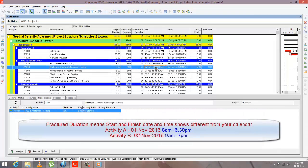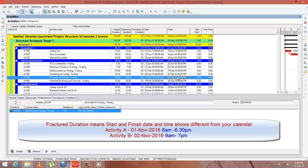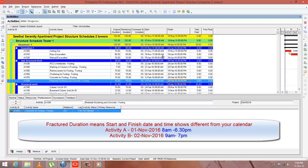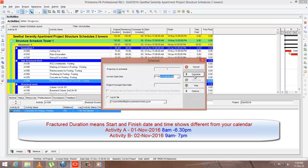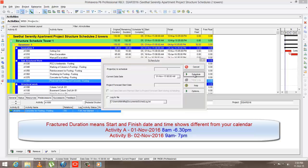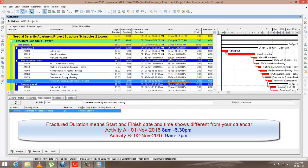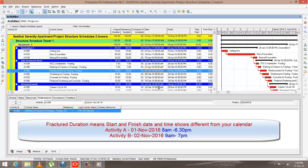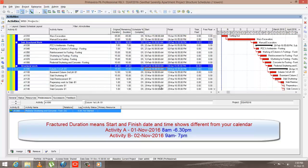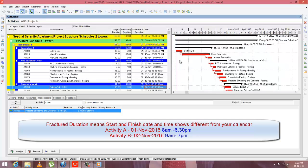Check the date and time as well. Here there is no fracture duration, so all the checks are done. Go to the schedule icon or press F9. Check the date and time and press schedule. After scheduling, check the date and time. Sometimes there is a chance for fracture duration, but in this schedule there is not.